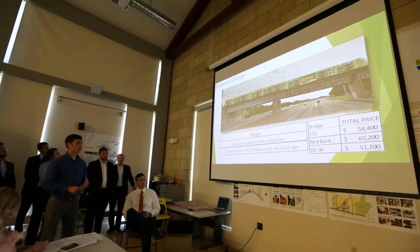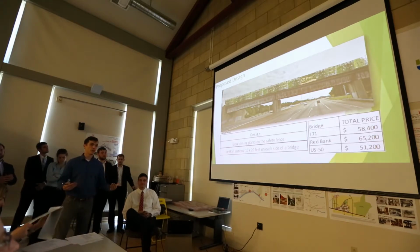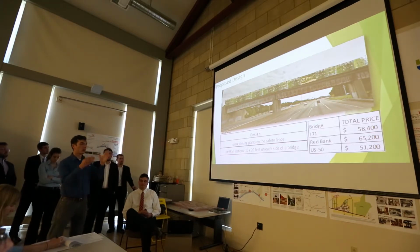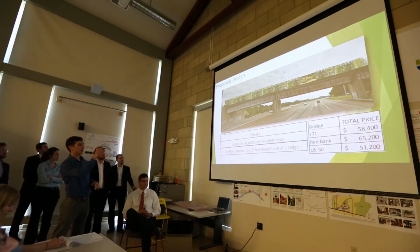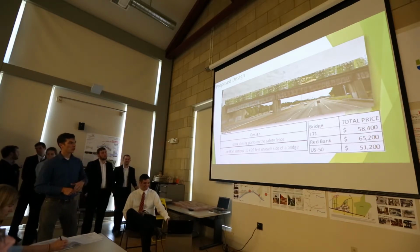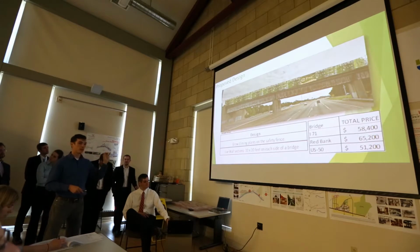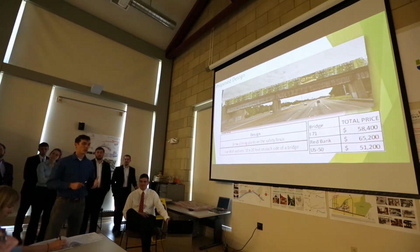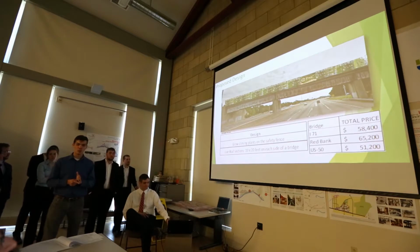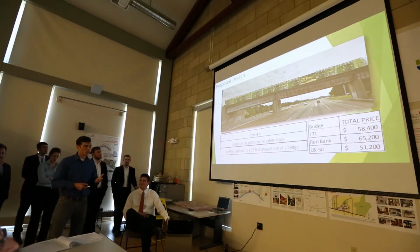So that's what I'm proposing. Excuse the graphics, it's not my strongest thing. I'm proposing to plant ivy along the fence in continuous soil containers and use a live wall as a section for advertisement. You see that PNC, it could be P&G or whoever's willing to pay more. The cost for each bridge is estimated there. If we plant ivy by itself on the fences, it's going to take a while for it to grow, but it's going to be so cheap. It's going to be $40 per linear foot, which comes down to about $4 per square foot of fence, which is not bad.